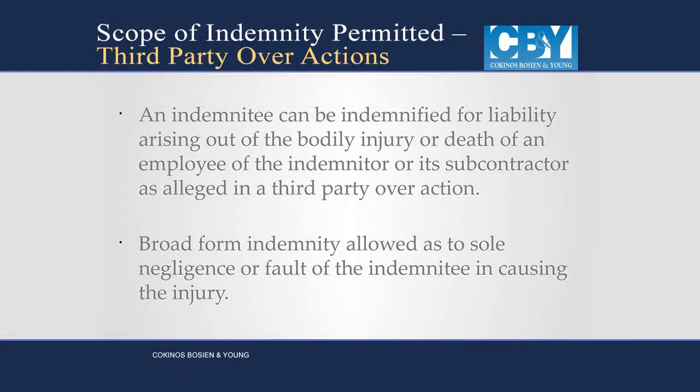General contractor will have the right to have the indemnity back against the sub in the event that he is sued. Let me kind of go back. If the subcontractor's employee sues the general contractor, and I've got the employee exception in my contract that allows the indemnity on the employee situation only, the courts will uphold that. Mr. Subcontractor's employee sues the general contractor, who can go back to the subcontractor and say, you indemnify me for everything, even if I caused the accident. A little unfair, I know, that's why it's important to know this. It's a little unfair, but again, what they're looking at is that the subcontractor should have controlled his employee on the site. Should have been adhering to the safety, and even if I have any part of it, that full indemnity is going to be valid.